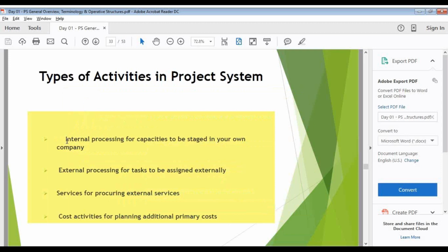If you assign persons to an internal activity, it means they are internal persons. They have their cost centers, they are under the same company code, and they will be performing their work for this particular activity, and their cost will be captured automatically. That is through KP26. In KP26, I will be defining my per hour cost for the cost center and this particular combination, the activity type.